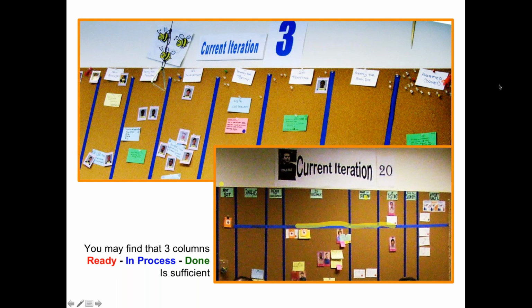So quite often people will also visualize the work coming in to their backlog. So these are just ideas. These are not even in current development, but they're managing work through their backlog grooming, their backlog prioritization, as opportunities, things they might want to work on in the future. And this is where they're getting UX, UE people involved to run experiments, maybe do prototypes, get those prototypes in front of people to get them ready to drop into development. So this is a Kanban board for discovery.